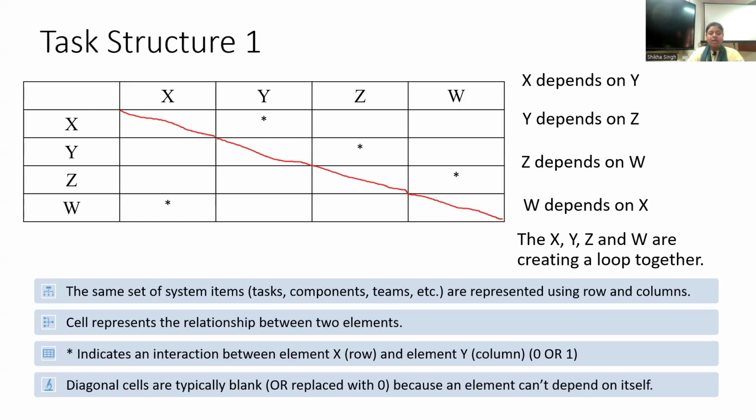It is very clearly mentioned here. X will be on top, X will be done first, then Y will be done. So when you perform X, though X requires input from Y, you are performing Y later. When Y is finished, only then the information processed from Y will go back to X. So once you have already performed X, now a piece of information you receive again. Don't you think that it is calling for more and more rework? Yes or no?